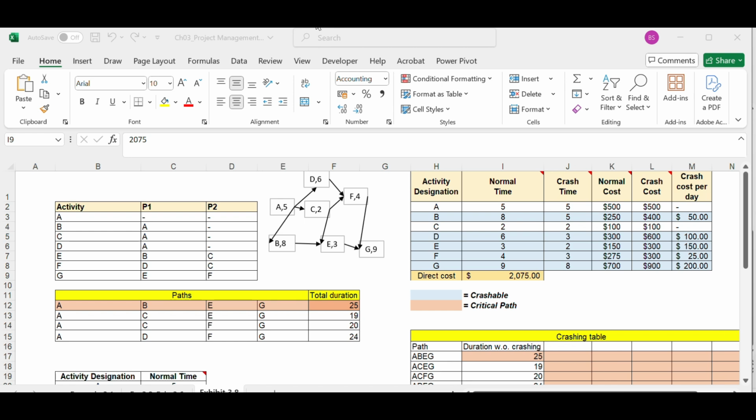There is a difference between the critical path and critical chain method. The critical path method only considers the logical dependency between the activities. The critical chain method also addresses the resourcing dependency along with the logical dependency of the activities. The critical chain is considered the longest string of dependency. CCPM puts a specific buffer for the critical chain and it expedites the activities. That is, it finishes the work early and passes it on to the next worker.